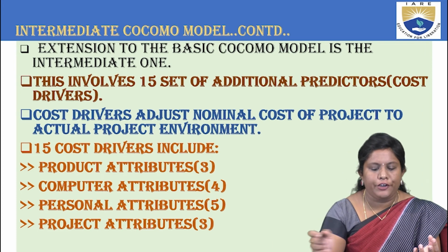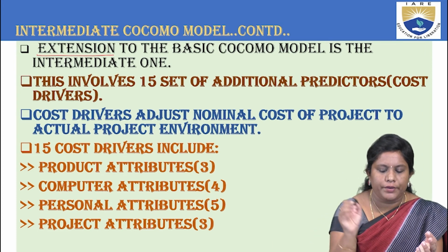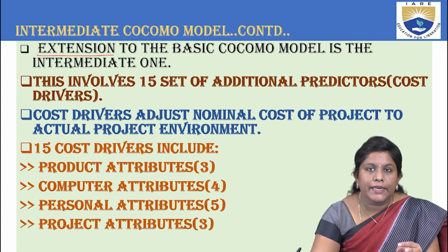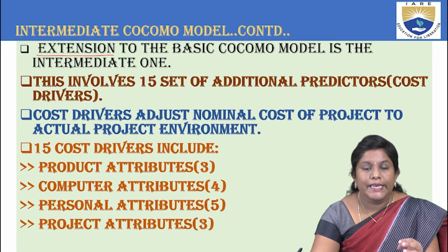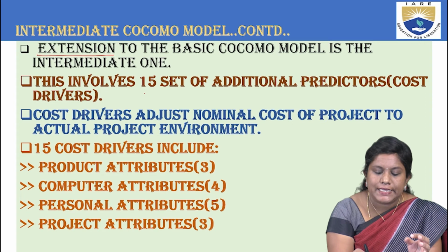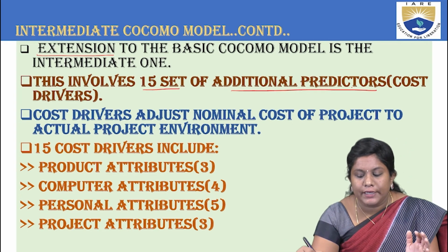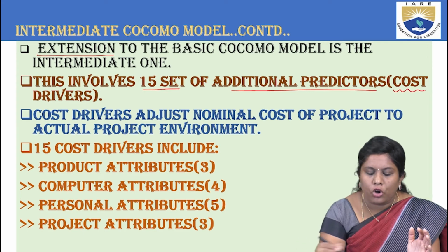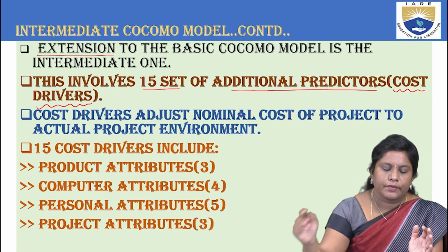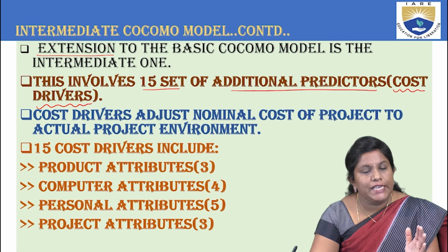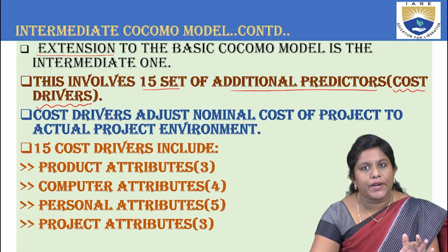That is a slight kind of extension as told over here. Next, this particular intermediate model involves 15 additional predictors, which are called cost drivers.